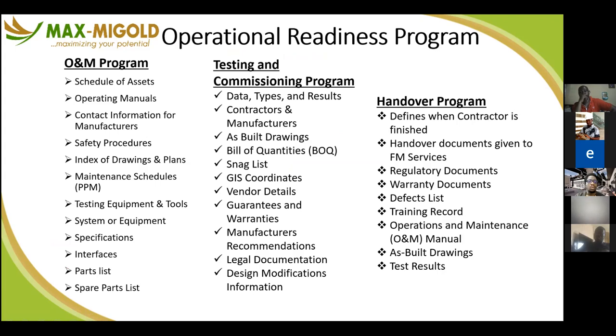What I normally would recommend is, because we have not been doing this as a practice in our development cycle or process in Nigeria, I will highlight a few of the items that you can put in as one plan, documentation that you should work towards making sure are in place while a construction project is ongoing. Your schedule of assets, your asset register should come out of that construction process. That's number one.